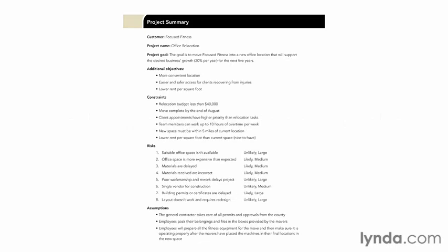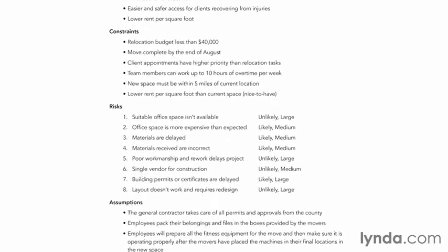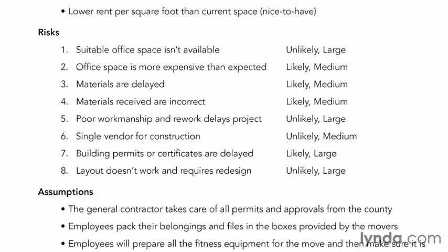Work with everyone on your team to identify risks. If you have colleagues who've worked on similar projects, ask them what risks they identified or experienced. As you identify risks, add them to a list. During planning, you'll use this spreadsheet to develop a plan for managing the risks, which we'll go over in more detail later.